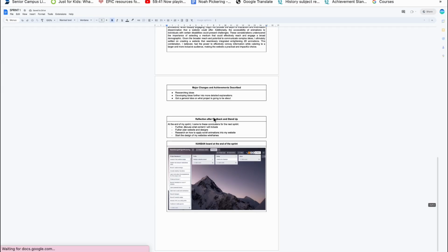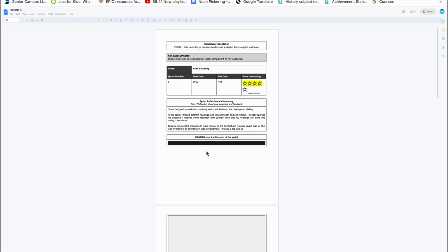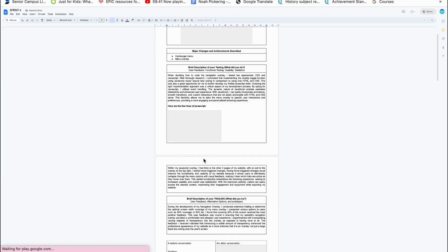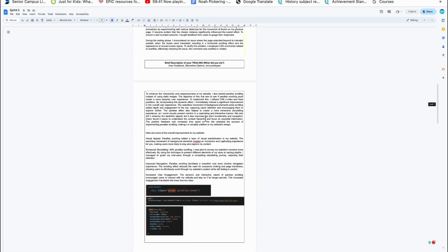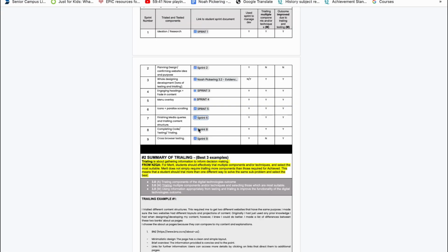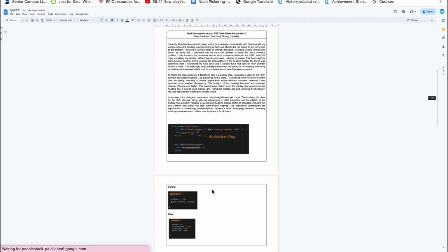I utilized an agile methodology for developing and managing my methamphetamine website, breaking the project into cycles for evaluation and feedback. This approach fostered adaptability and improvement in contrast to the original waterfall method. I engaged stakeholders every 2 weeks to discuss prototypes and enhance project elements continually through testing and trialing. This process of planning, development, testing, and evaluation ensured consistent and efficient progress in the time of my website building. I conducted a total of 9 sprints, each with different tests and different trials.